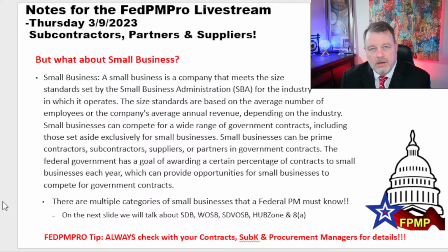But you also have to keep in mind that they are a small business. And so they may not have a depth of a back office. And when I say back office, like procurement capabilities or even contracts managers, sometimes I've actually been working directly with the CEO of the company, and they may not have a huge staff to help them do all of the stuff, right? So a lot of times there might be a situation where it may take a little longer for a small business to deliver something, or they just might not have the capacity to do something like a large procurement or something like that. So again, keep these things in mind, and absolutely no shade being thrown at small businesses.